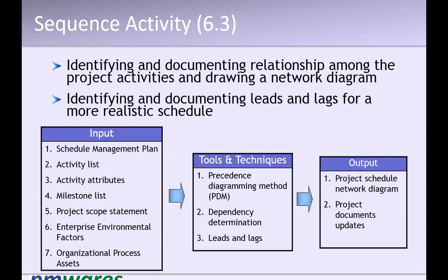Then it comes to sequencing the activities. Sequencing the activities means connecting these activities with the relationships they have with each other. Normally we use PDM, the precedence diagramming method, also called activity on node. What we get out of this is the project network diagram.